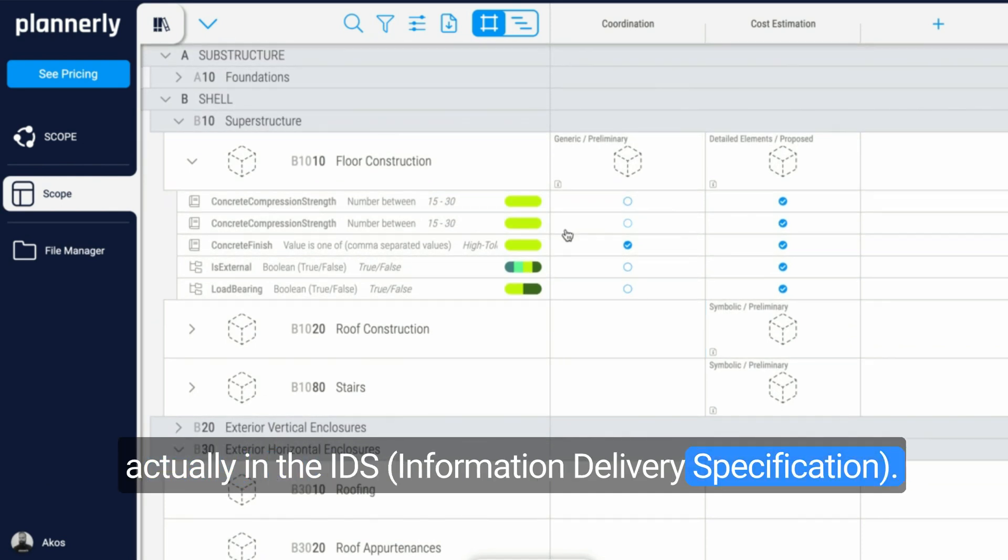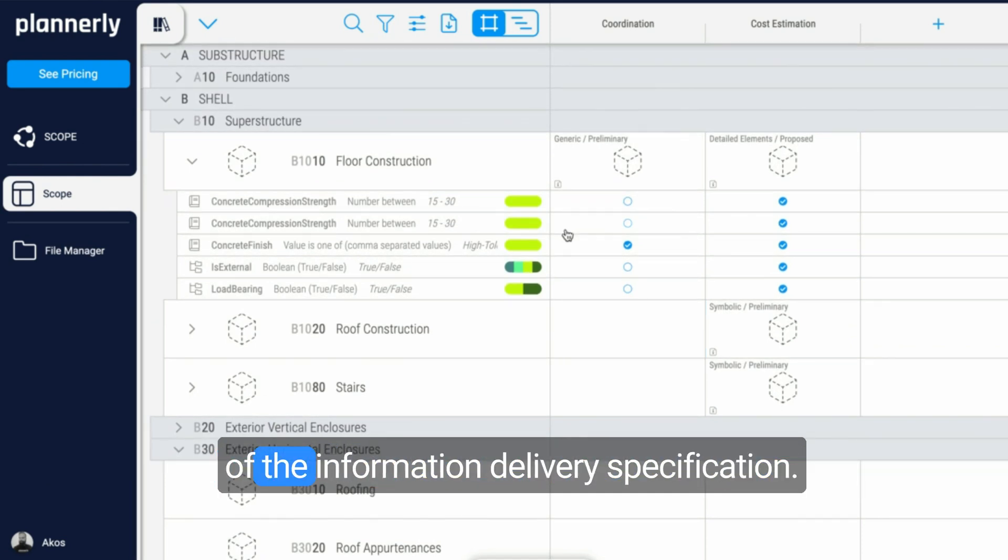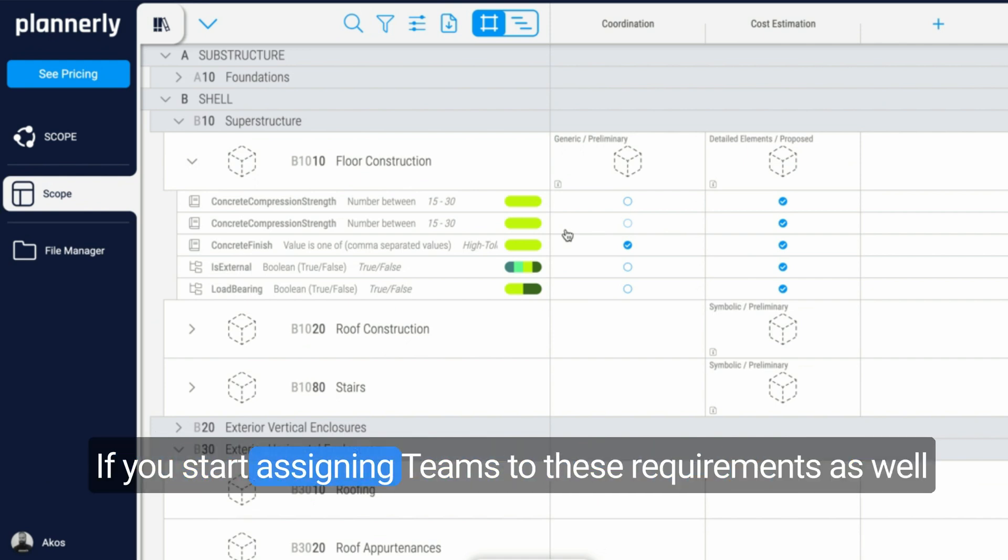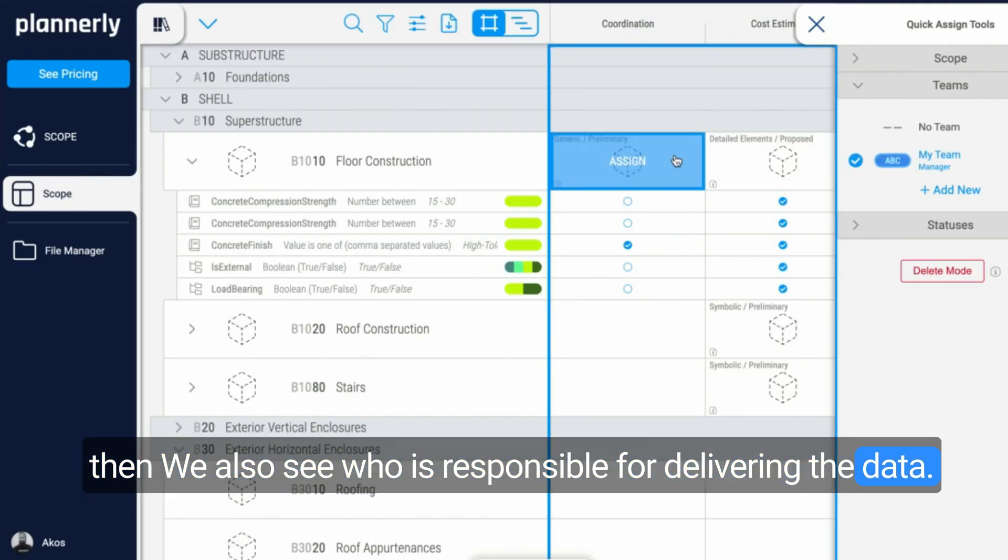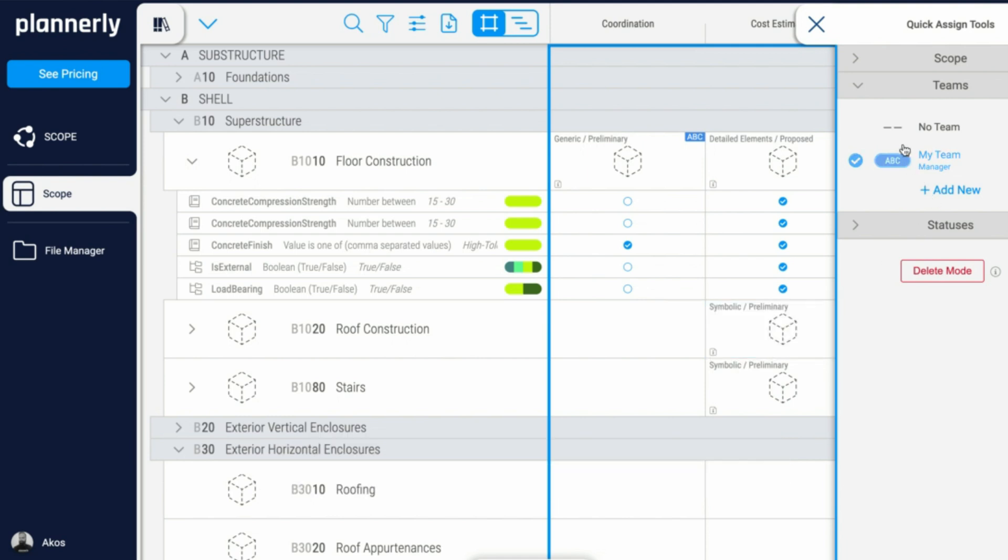Assigning these information requirements in the grid results in the IDS. This is now the human-readable format of the information delivery specification. Very easy to understand what has to be delivered. If we start assigning teams to these requirements as well, then we also see who is responsible for delivering the data. I'm just assigning these real quick to the ABC team.